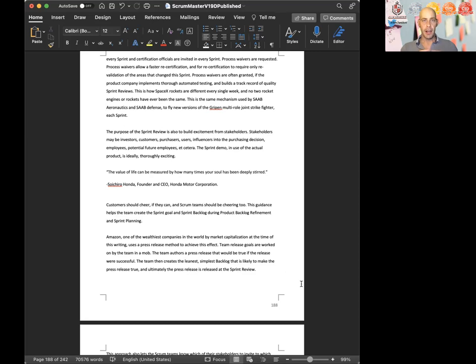First, the company automates as many of the tests that the certifying body will request as they can. This allows them to have fast feedback loops as they try and learn, test and learn, with rapid feedback on what are likely to be the final certification tests. They can run internal sprints this way.